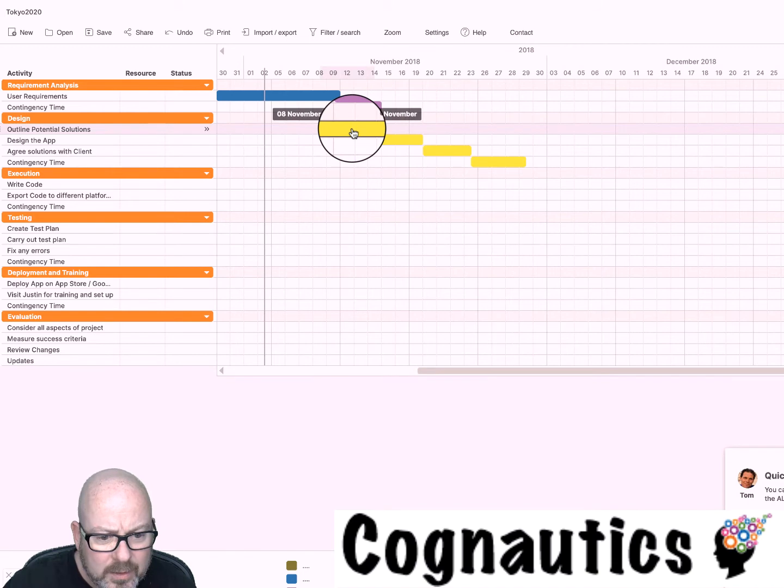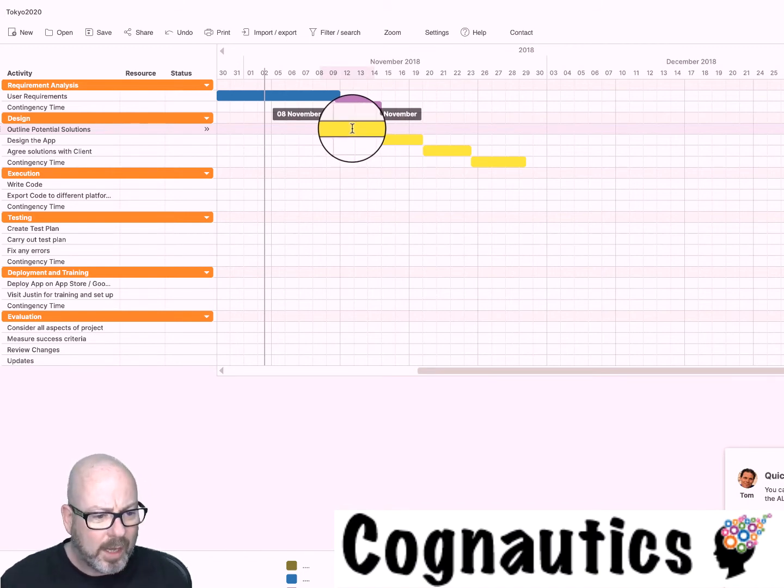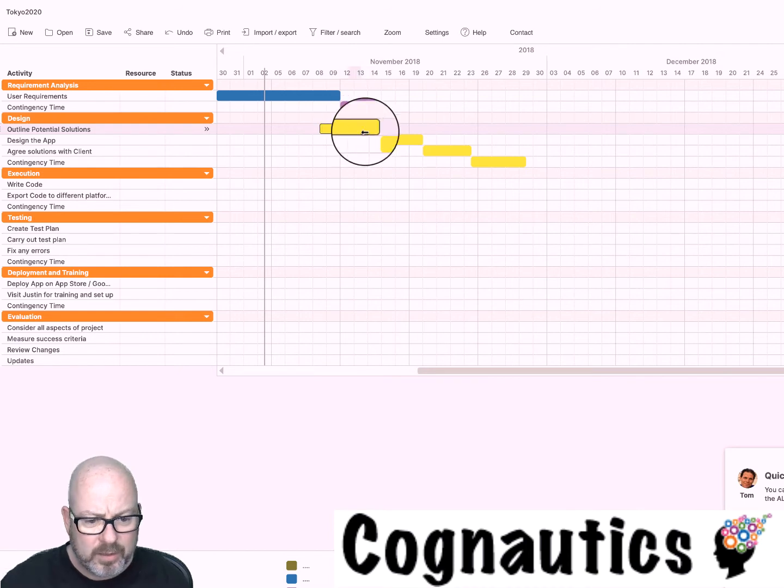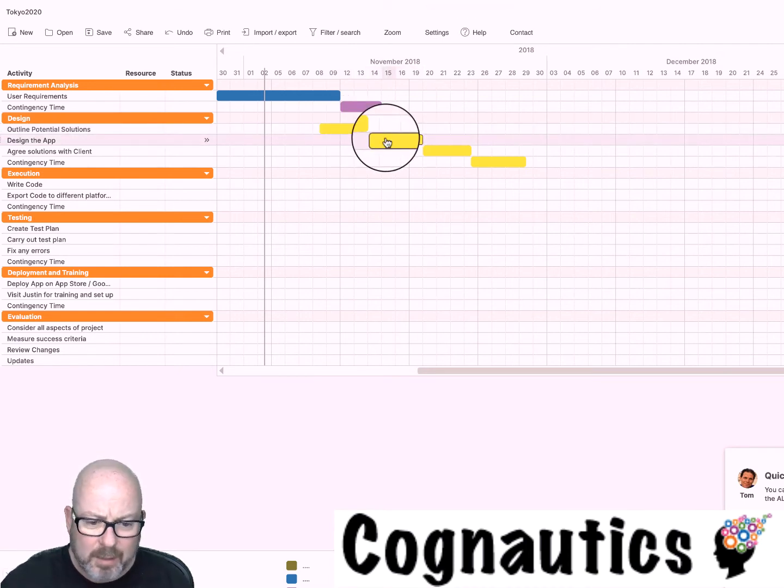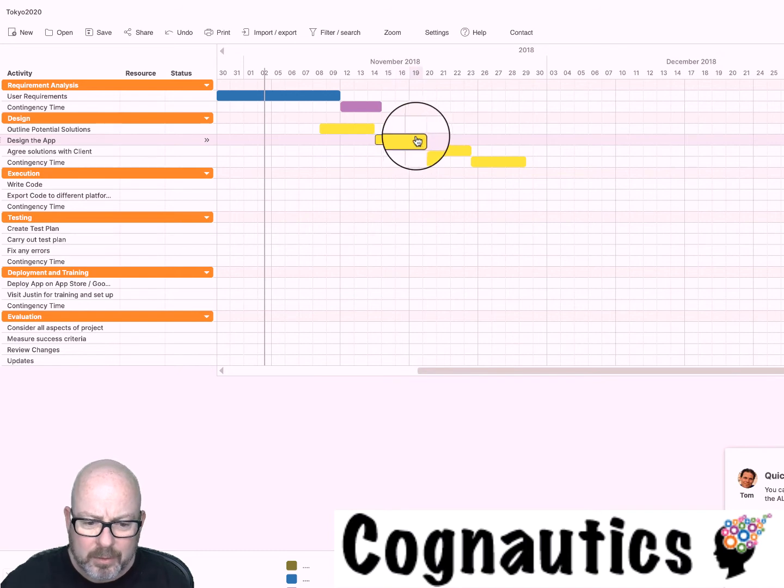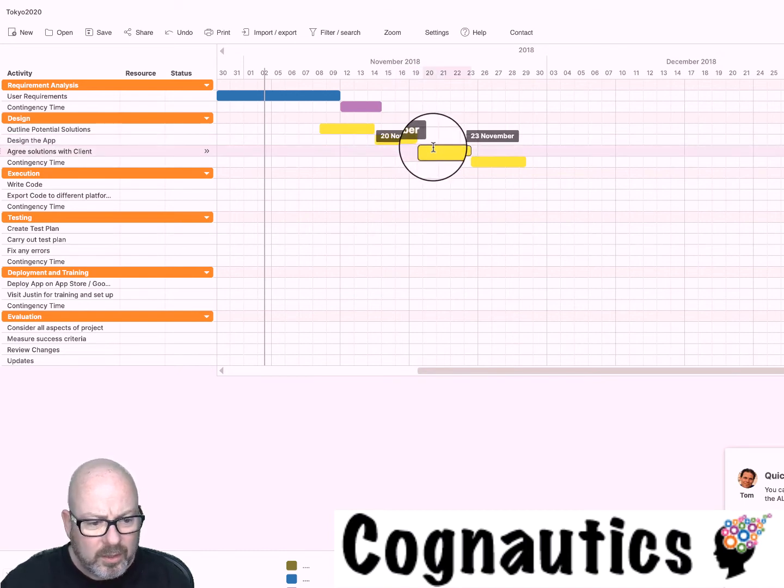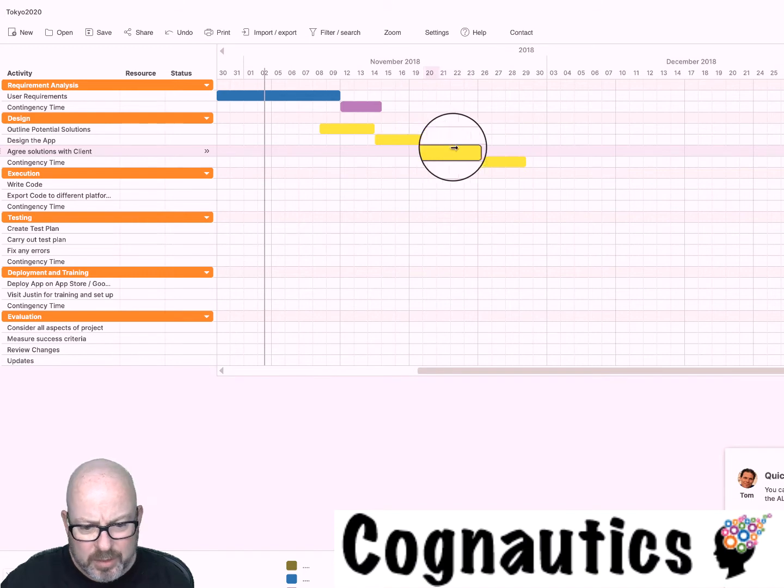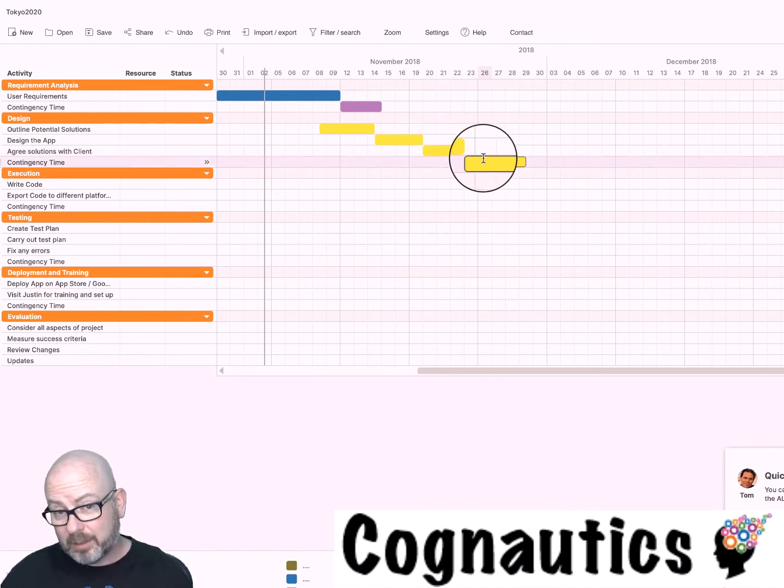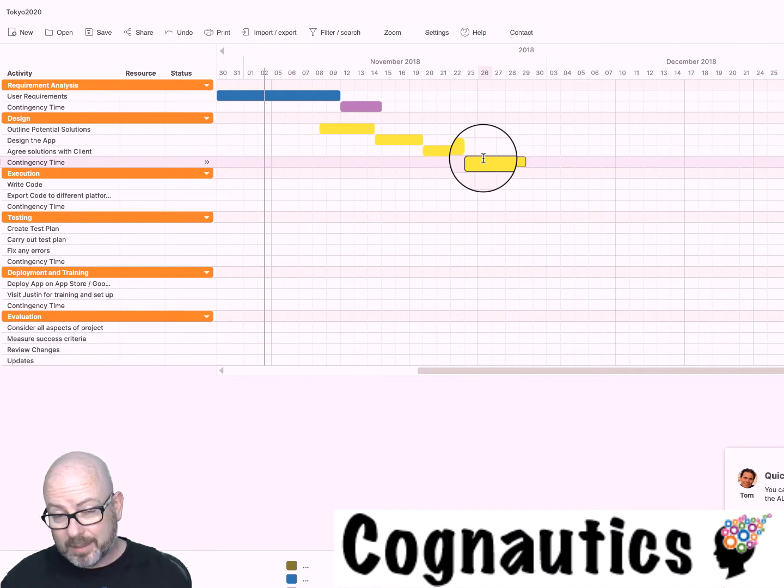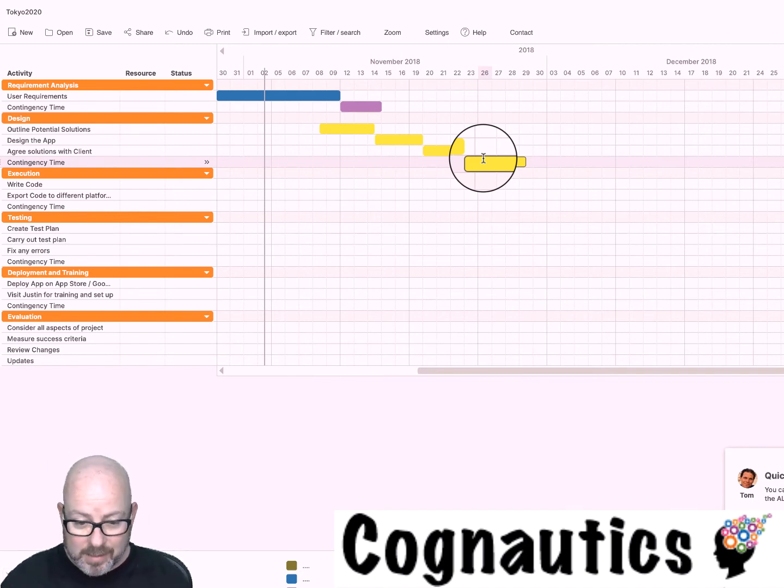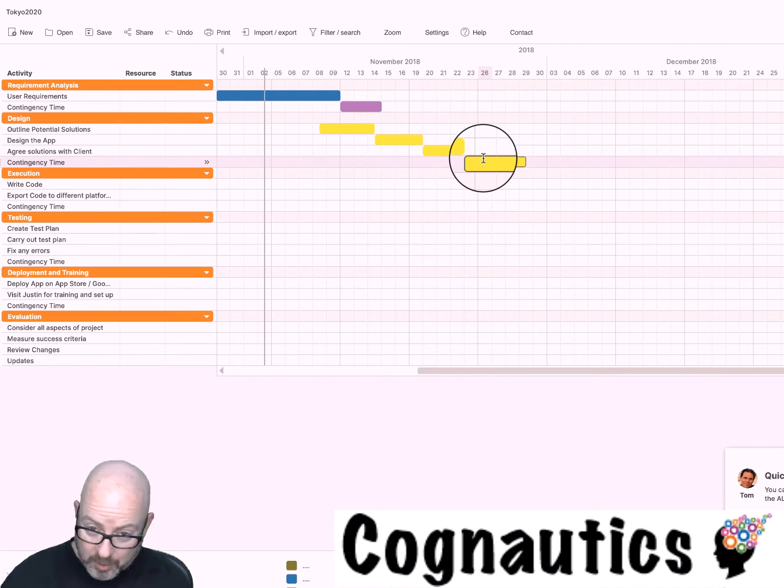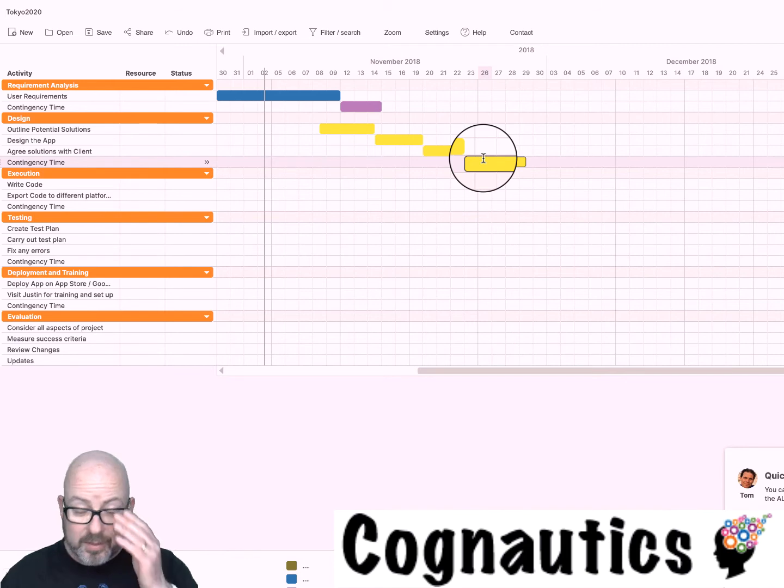Can you see how I've allowed eight days to the 14th of November, six days for outlining a potential solution? I've got five days for designing the app, might want a bit longer than that actually. I've got three days for agreeing the solution with the client. Now one thing you can do to make your life a lot easier is use dependencies.